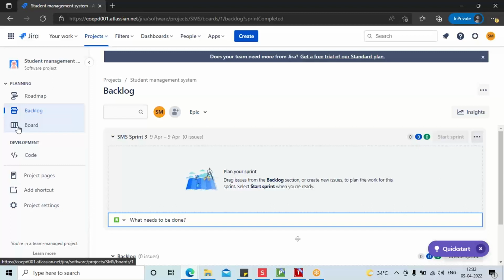No, we will not. If it is in development, whoever is the development person, API developer or integration developer, we will reassign that user story to him. We will not create the same one. Okay, then if the work is going on parallelly, what will you do? No problem, because only one user can be allocated, not multiple users, for the same user story. That's only in the Jira tool. Unofficially, the Scrum Master knows who is working on what. If you feel that the technical team is involved, you can assign it to the technical manager.